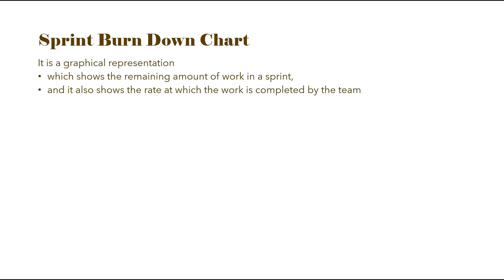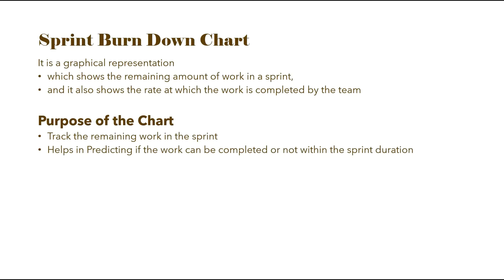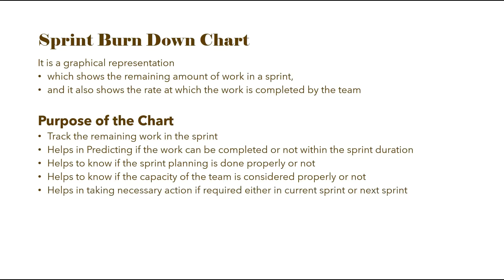A Sprint Burndown Chart is a graphical representation which shows the remaining amount of work in a sprint. It also shows the rate at which the work is completed by the team. The purpose of the chart is to track the remaining work in the sprint, and it helps in predicting if the work can be completed within the sprint duration.